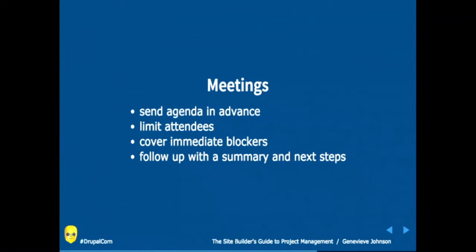All right, we all spend a lot of time in meetings, and some are more productive than others. What I have found helpful to have a productive meeting is to send the agenda to all of the attendees at least a day ahead of the meeting, if not more, especially if they're going to have deliverables to bring to the meeting.